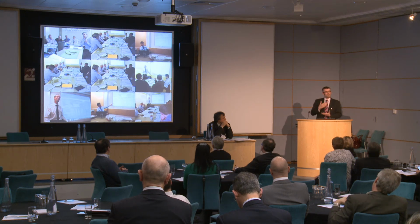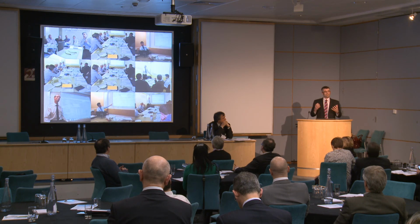And that's not a criticism. That's just factual and real knowledge, which was hugely important. So he said, well, hold on a minute. In that case, we need to halve our life cycle expectancy of these windows. So that was very real data, very open and honest communication, which actually was extremely valuable because it changed the way that the outcome came from the reporting process.